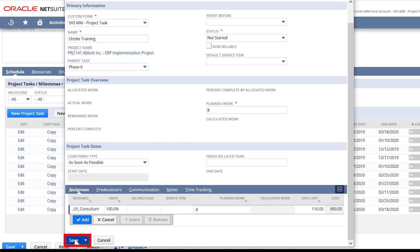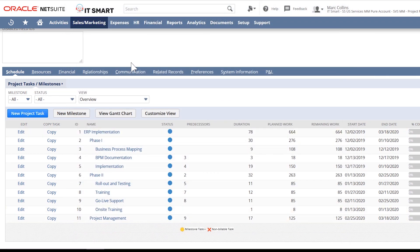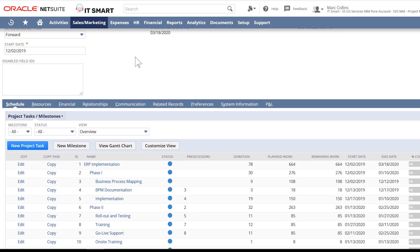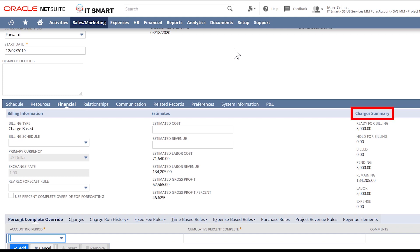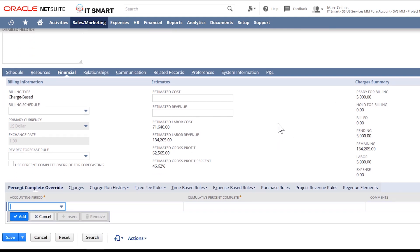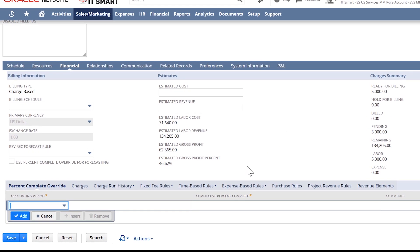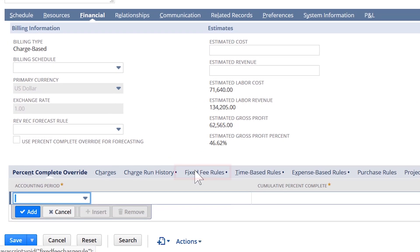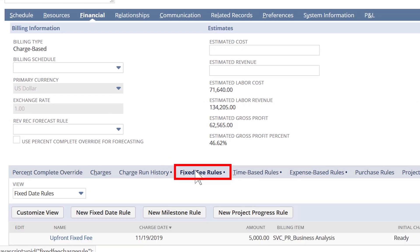Now that we have looked at our tasks and resources that came over from our project template, let's also take a look at the billing rules that were applied from our project template. Billing rules automatically notify accounting with accurate invoice amounts and when to bill clients. For these implementation projects, we bill our clients for time and expenses with one fixed invoice at project kickoff. Our invoice at kickoff of the project is under our fixed fee rule tab.